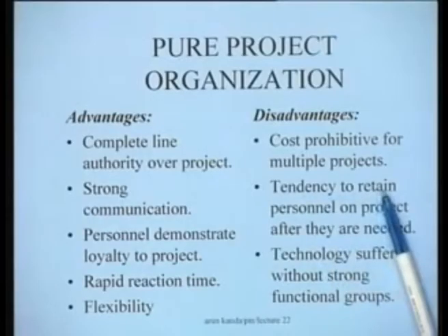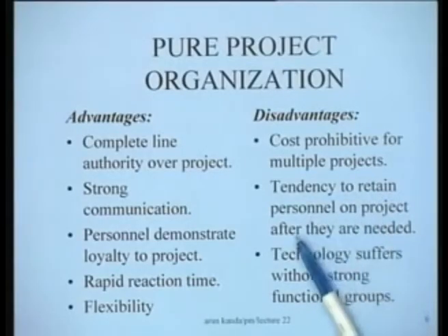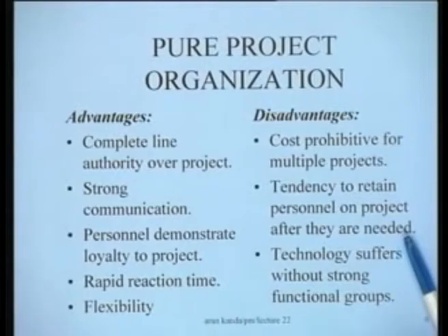There is a tendency in this organization to retain personnel on the project after they are needed, because after all the project manager has his team of functional specialists. So, even when the job of the functional specialist is over, the project manager may not want to get rid of his men, because either natural affiliations develop or he would like to carry on his so-called empire, something of that kind. So, there could be these kinds of problems.